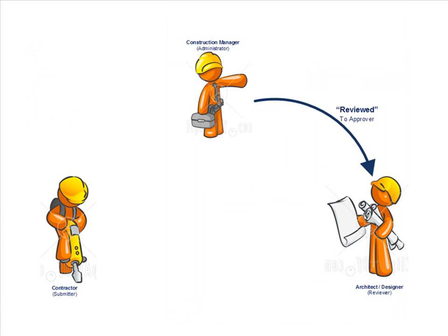The first thing the architect and the design team is going to do, of course, is look at the content of the specific submitted item and make sure that it actually verifies against the specifications of the project. They're looking to make sure that if, for example, the air conditioning was spec'd to be a 2-ton unit, that in fact the information provided and that the document relates to a 2-ton air conditioning unit.